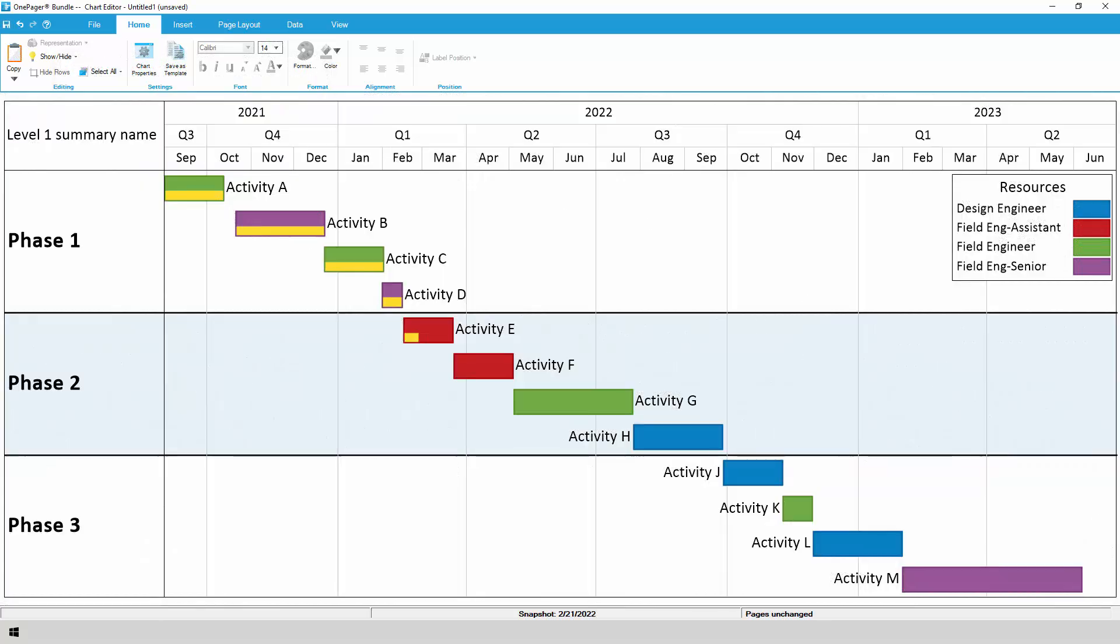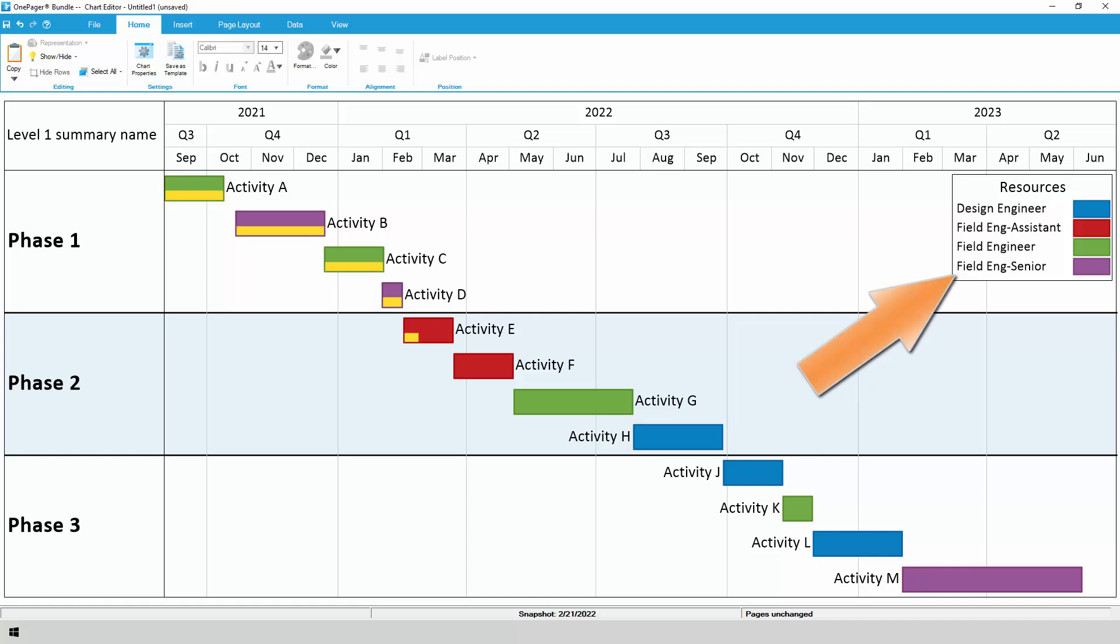By default, OnePager will place tasks into swim lanes based on their position in the WBS back in Primavera P6. This happens automatically without any need to drag and drop or set up special fields. OnePager will also initially color code your chart based on the P6 resource assignments.